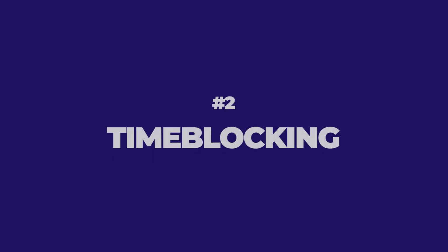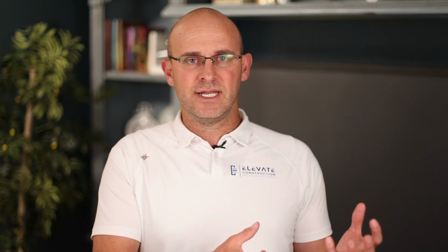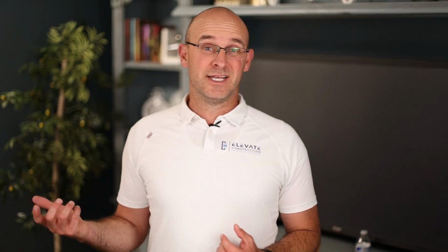The other thing I would do, if I had 5 projects, I would plan my weeks to where I'm time blocking these efforts, meaning for the most part, as much as I could, pending any changes, I would plan every week to where like Monday I could spend most of the day on project A, Tuesday most of the time on project C, Wednesday most of the time on project B. You're probably like, Jason, I can't do that all the time. Well, do the best you can. The less context switching you have where you're switching tasks and projects, and the more focused time you have for one piece flow and one process flow, the better off you're going to be.